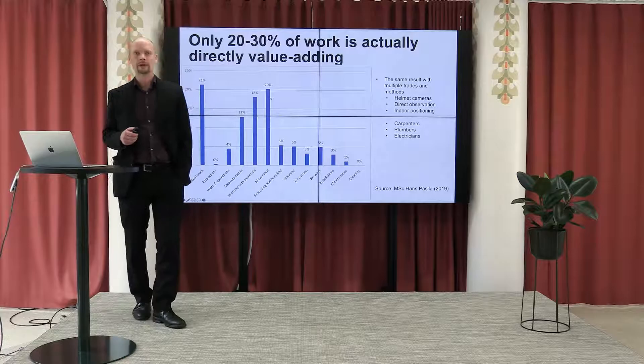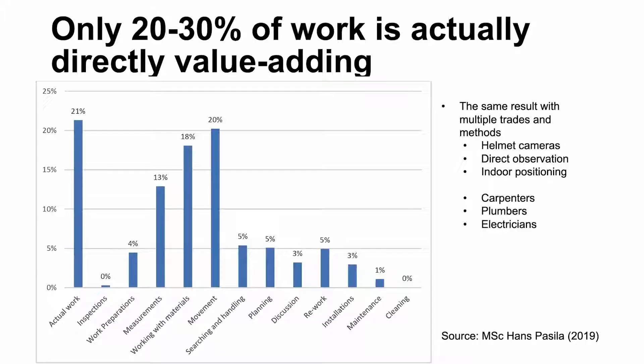When we go deeper into this phenomenon, we find that only 20 to 30 percent of work is actually directly value-adding. This is a study by one of my master's students who did his thesis on carpenters and their productivity, using helmet cameras to allocate time into various buckets. Actual work is just 25.1 percent of work time used — and that's with all breaks removed, so 21 percent of the time without breaks. Much of the time is movement around the building and working with materials, which is not value-adding from the customer's point of view.